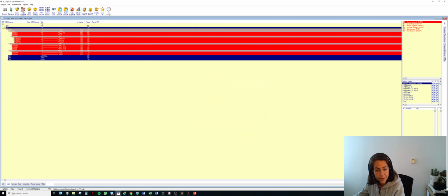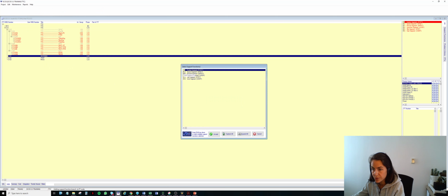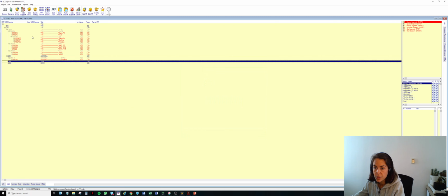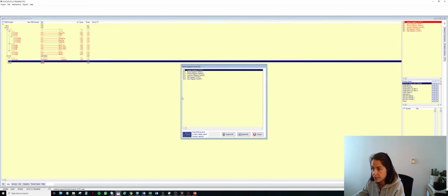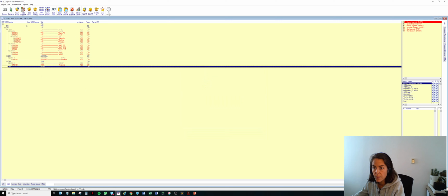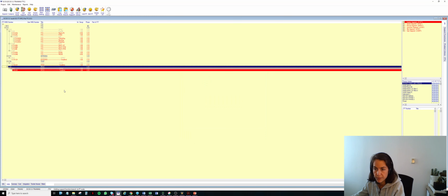Okay. I will have here some budgetary subcontractors amounts, so I need to insert the related support function, you remember, to be defined later. So here, for the antenna, the transponder, and the RFDU, I will be putting some support function to be defined later.